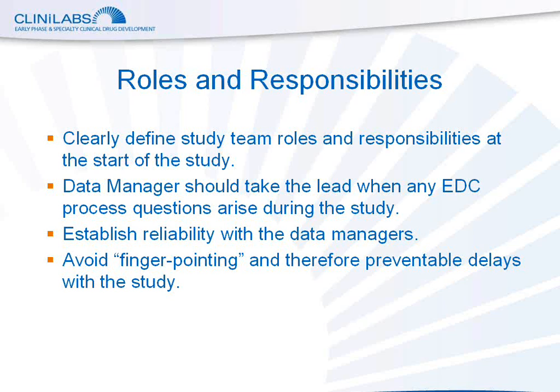Additionally, since EDC may still be new to some study team members, it's important that not only data managers, but the entire study team is clear on their roles and responsibilities. During the study, if a question arises regarding a responsibility, data managers should be trained to take on that responsibility, at least until the appropriate team member is identified to assume the task. This helps establish a sense of reliability with the data manager. This also helps to avoid finger pointing among the team members, which then results in study delays. Since EDC studies are usually fairly time sensitive, it's crucial to avoid these unnecessary holdups.